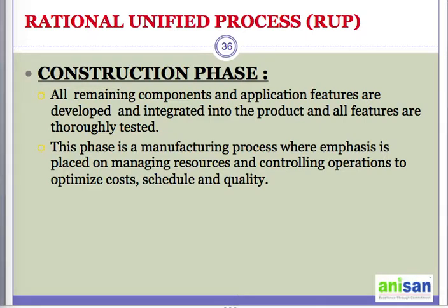When it comes to the elaboration phase, the outcomes were very simple. The use case models are ready. That's almost 80% of the use case models are ready, and we also identified all the use cases, and actors are identified, and most of the description is completed. Supplementary requirements are captured, and non-functional requirements are also documented. Then we have a software architecture description.